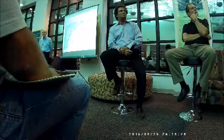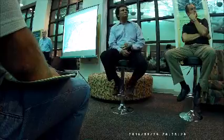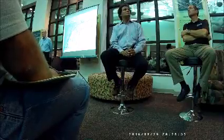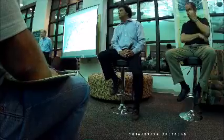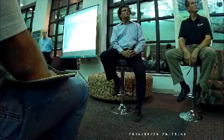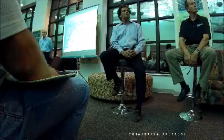And somebody raised a good question, if we had to do brick and mortar, would we do it? That's a lot of money. I think Frederick was north of $8 million by the time. Including infrastructure? And the FAA only paid, I think, up to $1.5 million eligible. Right. And the little old town of Leesburg is not going to come up with $5 million. Not going to happen. And they need about $600,000 to $700,000 a year to keep something running. We've got to figure out who's going to pay for that.